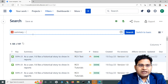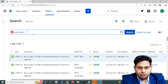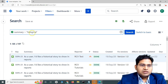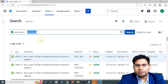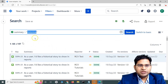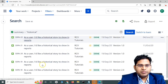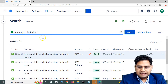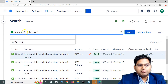After the tilde operator I can specify the text I'm looking for — so in quotes I can say 'historical'. What this will do is search through the summary contents and wherever this word 'historical' appears, it will filter and return those issues. If I click search, you will see six issues have been returned and all of them contain the word 'historical'.